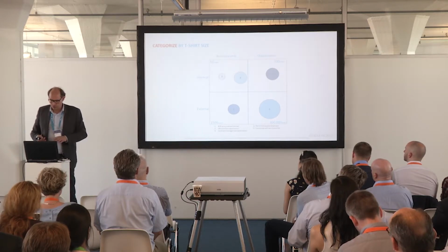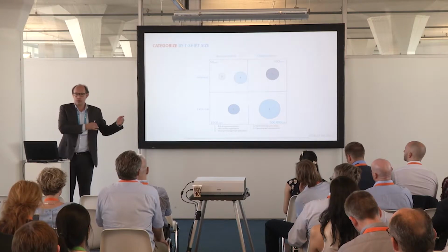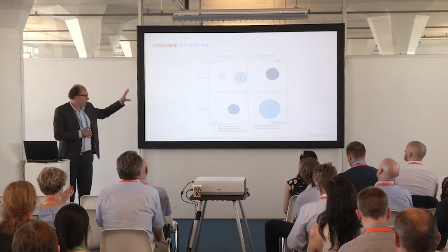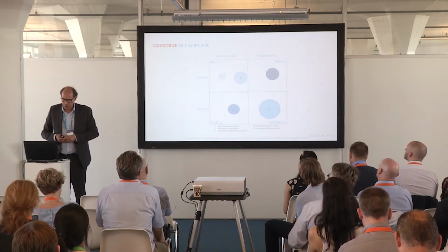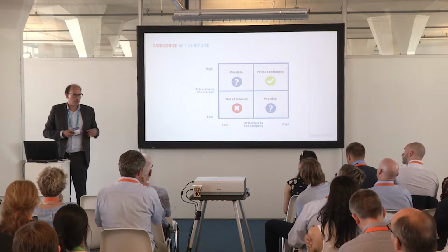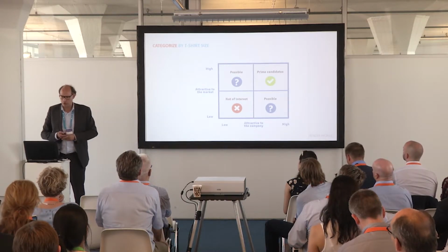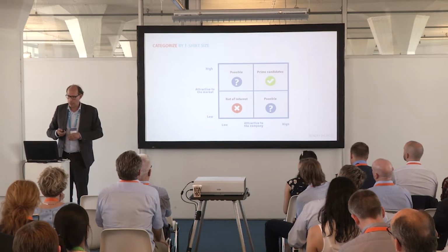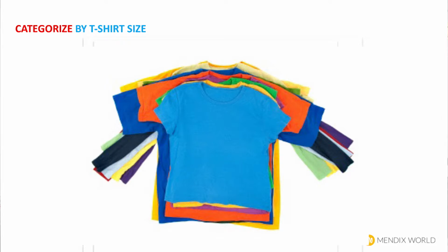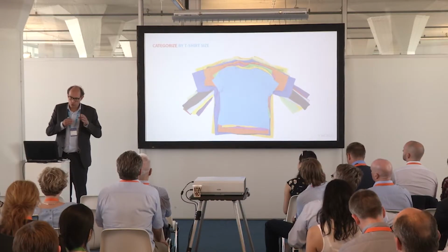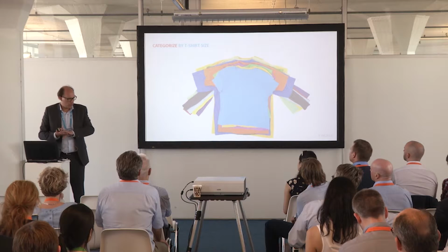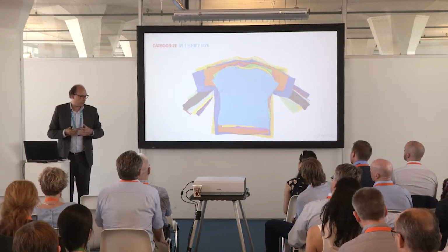So you've looked at the strategic core themes, you looked at potential velocities, because you've already created this one application with your team. You know how fast you can create this application. You can therefore transplant that to the different other potential projects. What you should also do, of course, is look at the market and the potential attractiveness of the proposal and the proposition that you've created. You need to use that in the balance of the specific application that you want to build, and use that to prioritize, but also to t-shirt size the different projects. Because what you also want to do is, with the team that you have, map those specific projects in time, sequentially, by value, to have the highest impact for that specific portfolio.